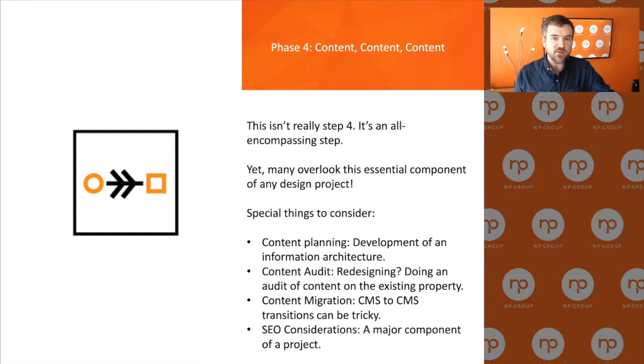And also SEO considerations. Remember how I just said having a document that has your old URLs versus your new? Well, the reason I want to know that is because I want to redirect. So one of the things you have to be aware of is when you redo a web design, there is inevitably a little bit of a hit to organic search. We try to minimize that as much as possible. We try to mitigate that risk, and the way we do it is through the audit. And then, obviously making sure Google knows things have moved from place 1 to place 2. So you have to think about that during your entire process. For me, we're redoing our site right now. I'm extremely conscious of this because organic is an important traffic source. So we're being very, very careful with it.